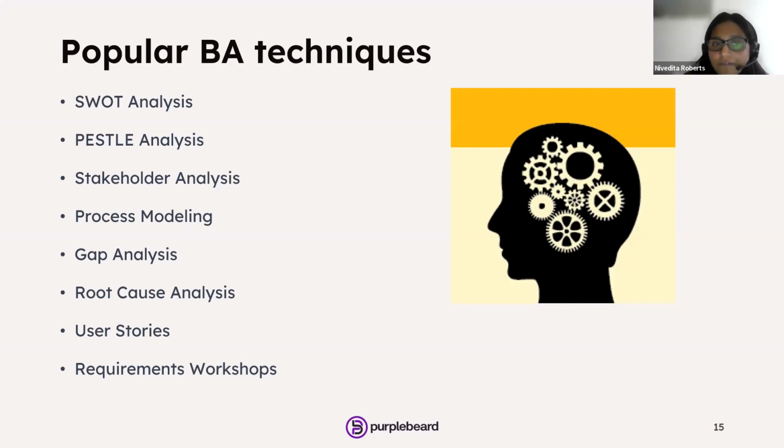You need to have the skill to write a user story, because with every user story you're also documenting acceptance criteria. These acceptance criteria form the basis for writing test cases. So you'll be supporting the development work by writing test cases also. That is why you need the skill and the knowledge of what a user story is, how you write it, and what the value proposition is.